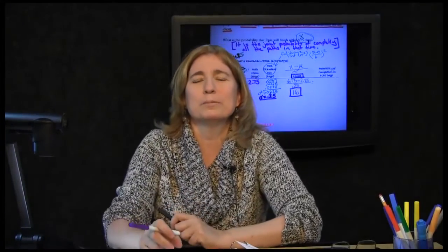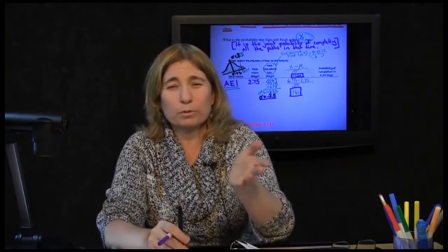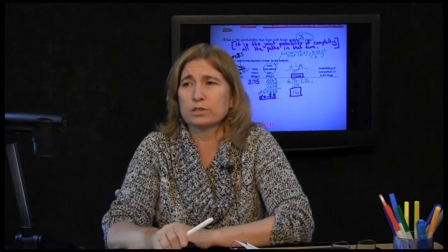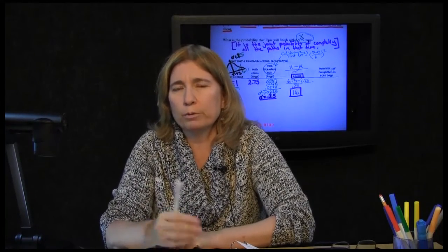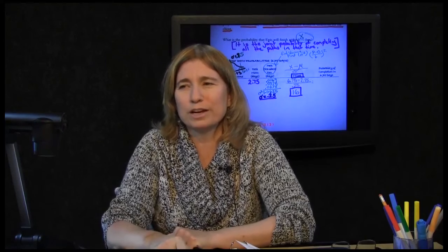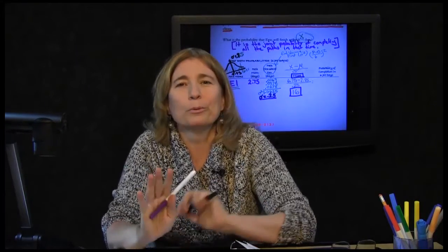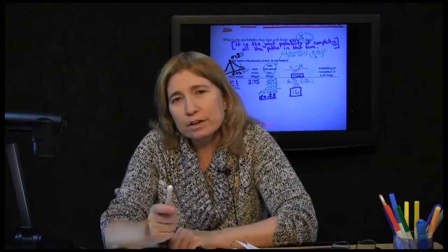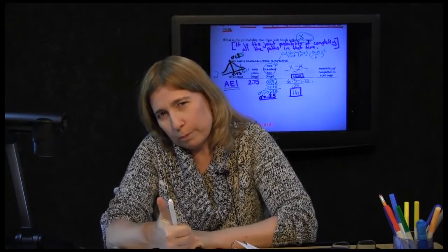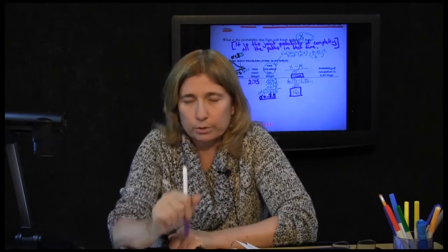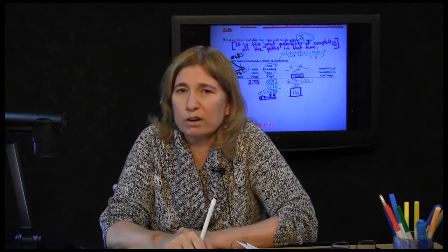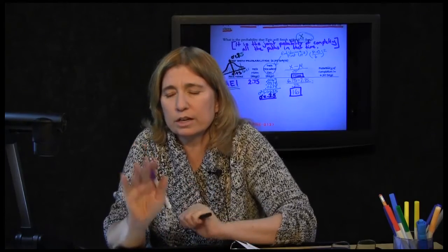Oh, you know what that means? It means, remember the original question was, we were a little worried, AEI, that sequence of tasks, what's the chance that we would be done within 6.75 days? The answer is, don't worry about it. You'll be done within 6.75 days. The general rule of thumb: if a z-score, once you've computed it for a path, comes out greater than 3, just treat it as 100%.